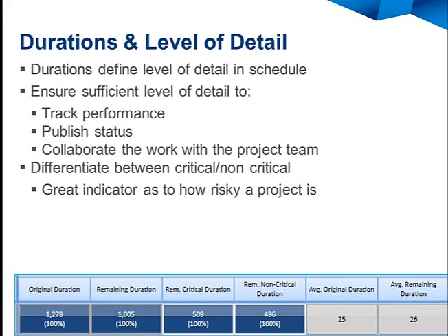I'd love to be able to answer why on that right now instead of later on when the project actually finishes late. Let's find out what's going on. Let's find out what the sand is that's getting in the gears on this project, that's causing, what is that, about a 4% inefficiency across the board in all my activities. Are we understaffed? Did we not understand the scope? Did we not sequence things properly so they're taking longer? Did we use a bunch of lags, but now the real duration is actually taking longer because we had stuff hidden in the lags?